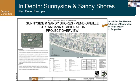And then we've got all the different parcels laid out, and you'll see this dotted line that is our access and construction access for this. Up here in this area, that is going to be the temporary construction access area. And the one along the shoreline is going to be more of a long-term riparian area, just for monitoring, for the conservation districts that plan to monitor the banks and the vegetation, how the plants are thriving, for 3 to 5 years after the project.